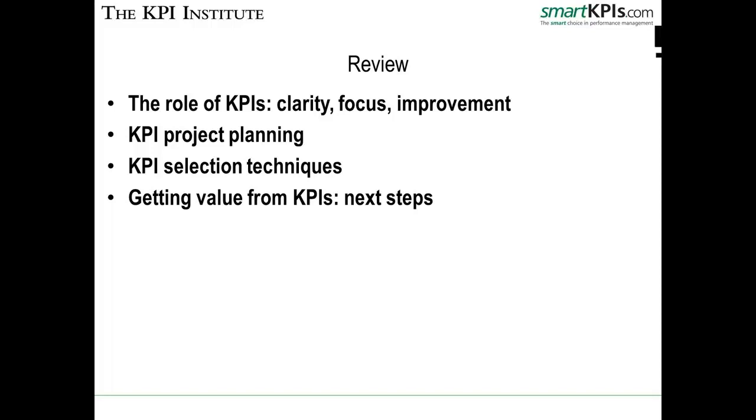The reason why it takes so long is because the preparation phase takes quite a bit, but also the data gathering and the activation of KPIs will take generally about a month. So at the minimum we can spend 1 month initiating the project, taking care of stakeholder communication, research, KPI selection workshops, documentation, and then another month on gathering the data and reporting.